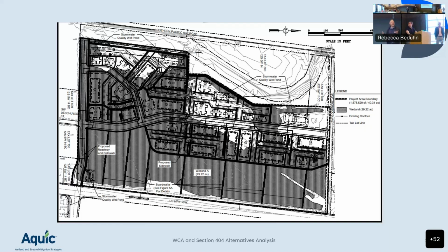From there, you gotta get down to the details about the actual configuration of some of those structures, like in the roads. So what kind of zoning constraints are under there? Has this been platted? Where are we in that review? What efforts have you made to remove those zoning constraints? So by asking those first questions, how many units do you actually need? Well, that might change the look of that map.